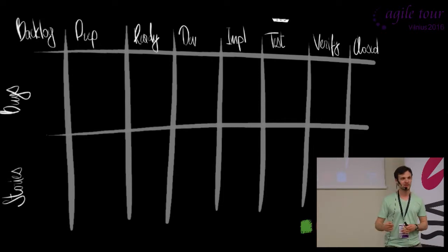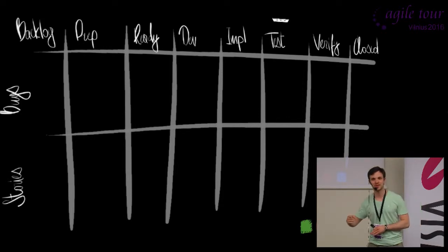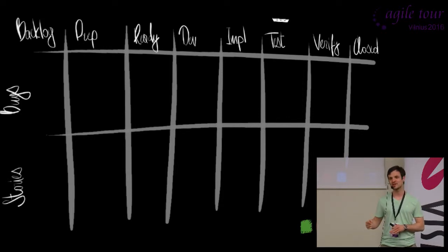After that, we also agreed that if there is any bug on the board, this means that we must start fixing it. So at least one bug on the board, start fixing it. That was the agreement. And I'm already jumping to the next principle, which is making policies explicit. But this is how visualization evolves. Again, you want to start with what you have.